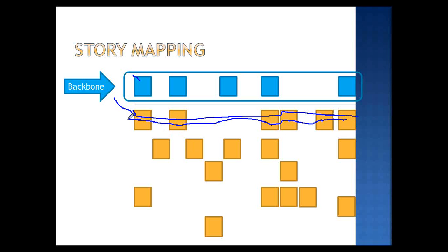What are other things you could do? Well, you could come to the website and look at reviews, right? This was adding something to your cart. Maybe you don't add it to your cart. Maybe you look at reviews. But you do that maybe less often than you add to cart, right? And so it's down lower on the frequency of use. And then you might come back up here and use it, and it goes through the same flow. But the vertical is showing you frequency of use.